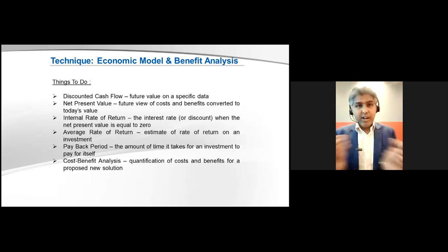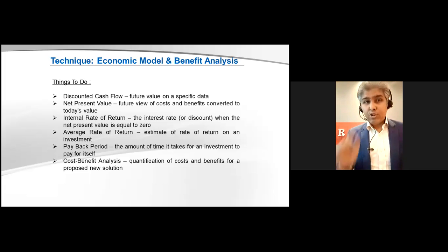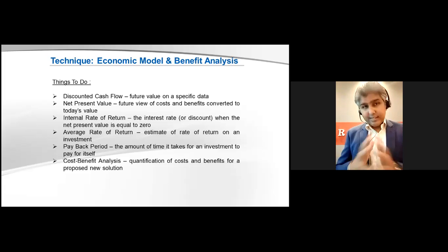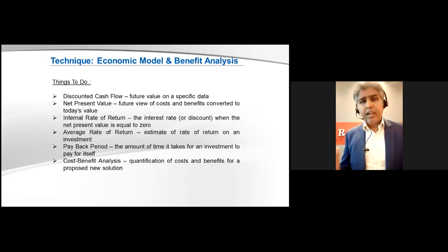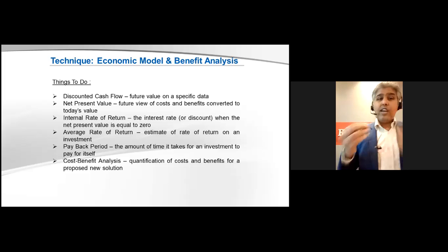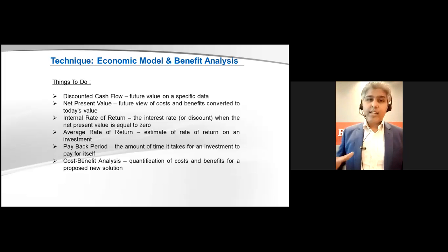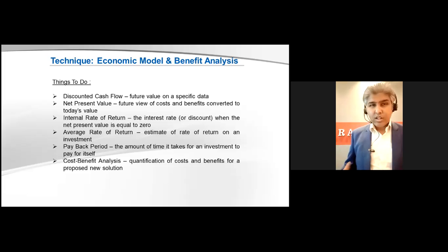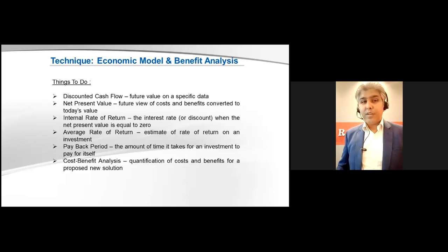Usually if it's a software product that you are doing, the payback should not be more than 1 year. That's the internationally accepted standard for internal implementation. If it is more than 1 year, it means you are lacking some business value from that solution. You have to add some more business value so that you get an earlier payback period. Sometimes it means the business case is lacking.